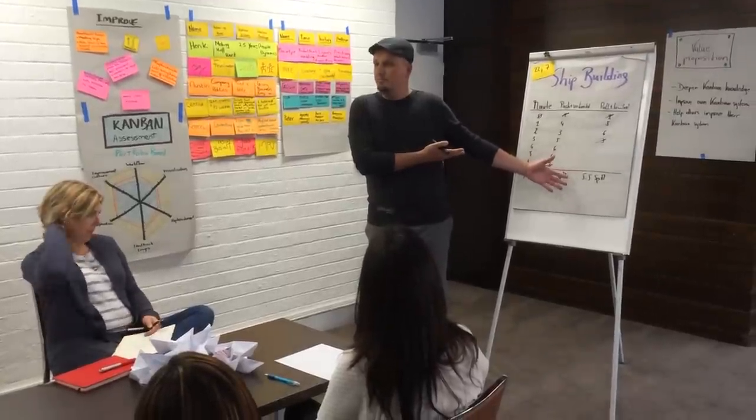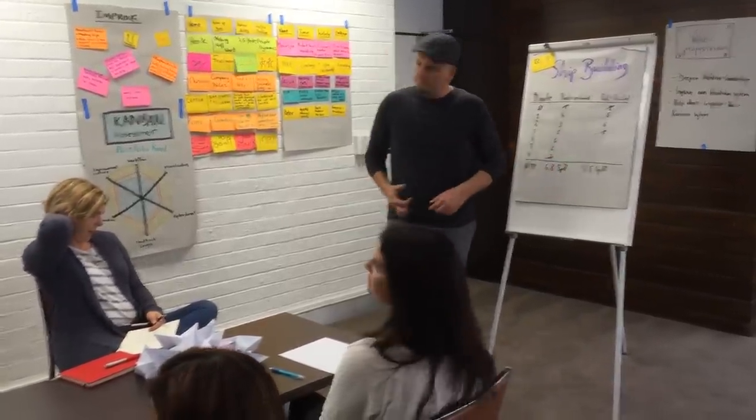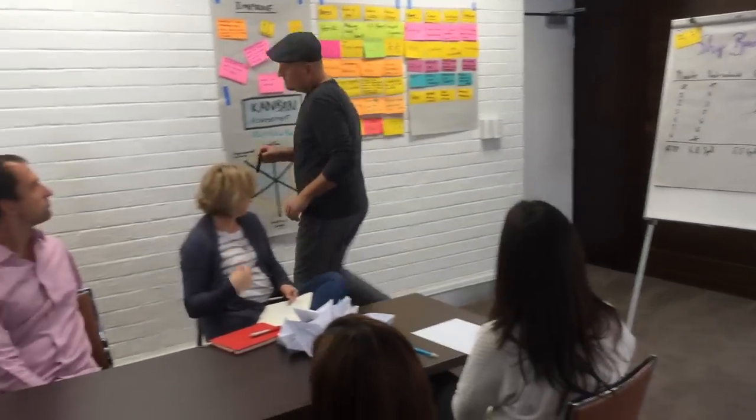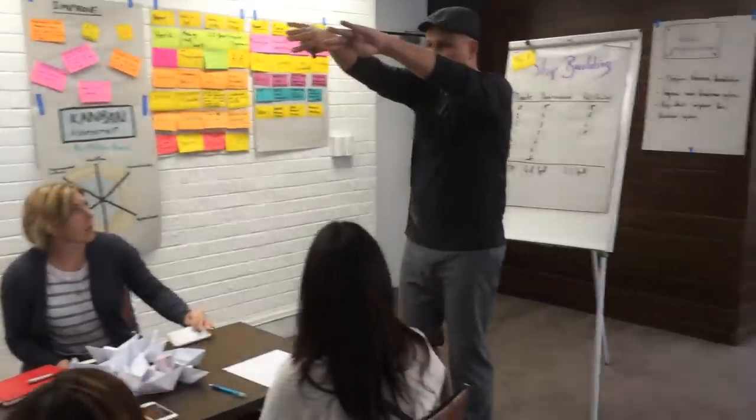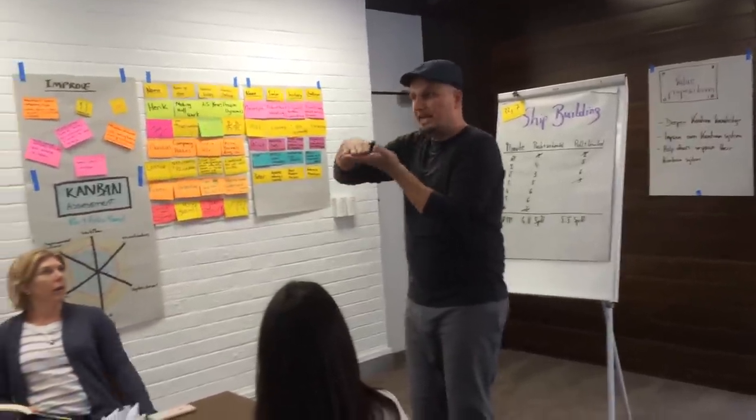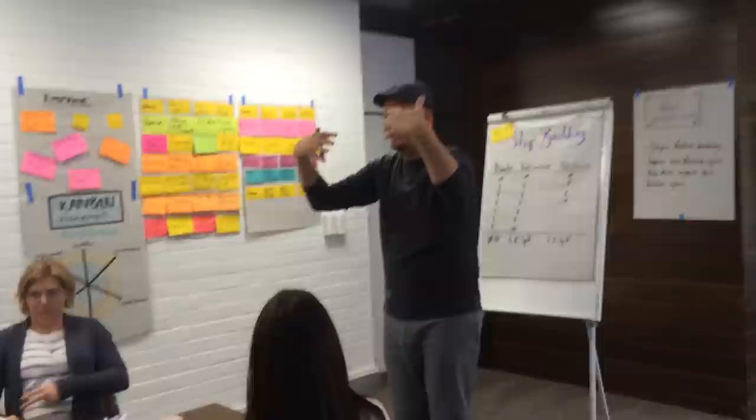We earn the same amount of money, and probably spend more money on production, on actual production that's lying there, not finished, not used. For instance, steel and all the rest. So how do you help in the bottleneck in a flow-based system? We would install some kind of buffer in front of the bottleneck. You are folding into the buffer, and when the buffer is full, you stop working, go to the bottleneck, and fold out of the buffer. When the buffer is almost empty, you go back and feed the system again.